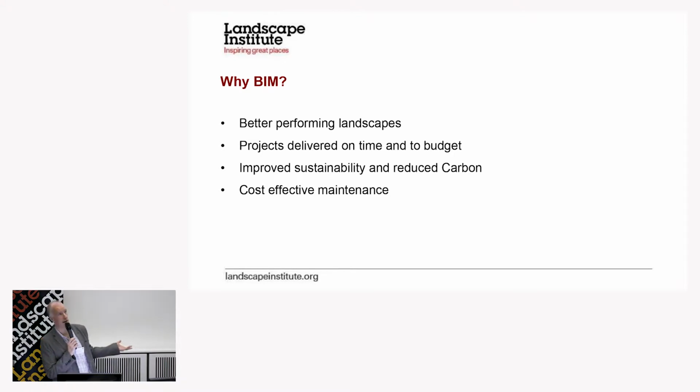I work as a landscape architect, or used to, in the public sector. The biggest problem we used to have in the public sector was that we would spend a fortune on the capital investment, and it would fall over in maintenance. Usually because of the handover process, because the budget wasn't set properly, the asset management wasn't considered properly. And really what BIM's trying to do is get better information to the asset managers to deliver what you as a designer want to achieve.